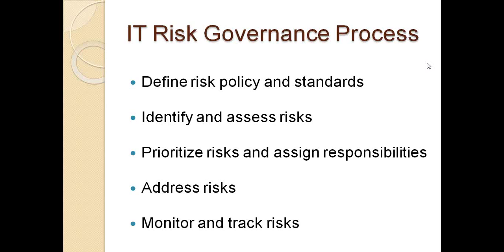Once the risk register is populated, then the prioritization of what risks need to be addressed needs to be performed. It is important to note that the business should determine the priorities based on resources and the risk appetite, and it is likely that high-risk items may not get done first.